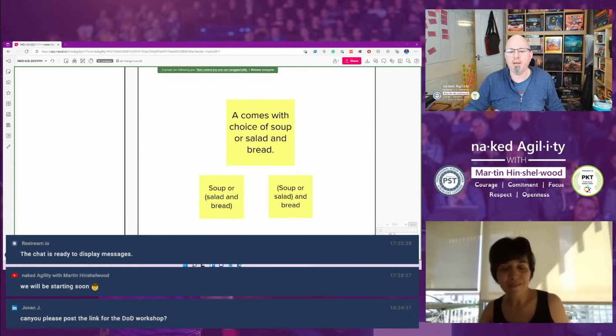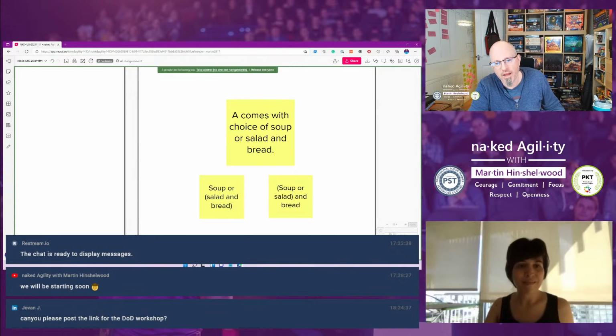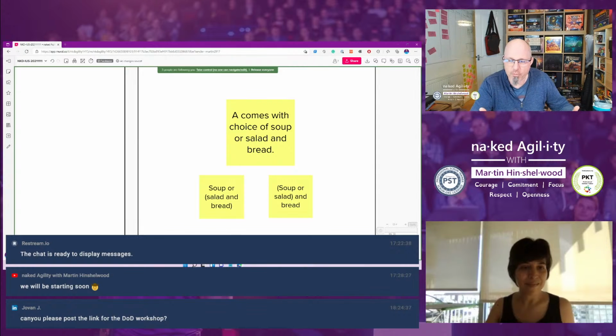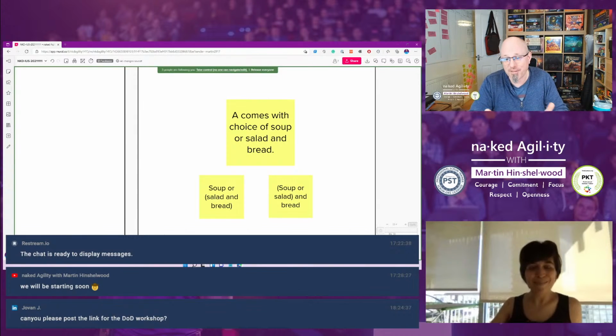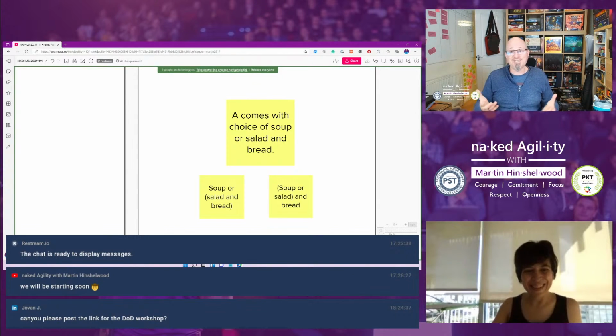Oh, as many as we like. Well, we can't do that, right? We can't do as many as you like. You have to pick a number and we're going to measure based on that. Okay, 200 simultaneous users. Awesome. Now I've got 200 simultaneous users, 500 milliseconds. I can put that on my definition of done and run it as part of everything we do. And then we'll always have that. You've got to ask those questions.